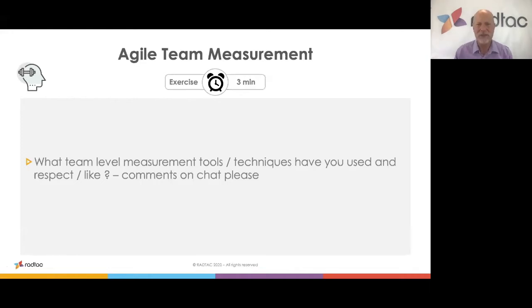From Dina, bug tracking, yes, certainly we need to be looking at how many bugs are coming in, how many bugs we are fixing, how many bugs are left, is the amount of bugs going down. A very typical example of technical debt, or where we have too much technical debt, is when we start to track the bugs and they go up and keep going up. That probably suggests we've got a lot of technical debt within whatever it is we're creating, so we've created something that works functionally, but it doesn't work well technically. So there's lots of bugs and errors in it. That's giving us a good indication there, possibly, that we've got too high technical debt.